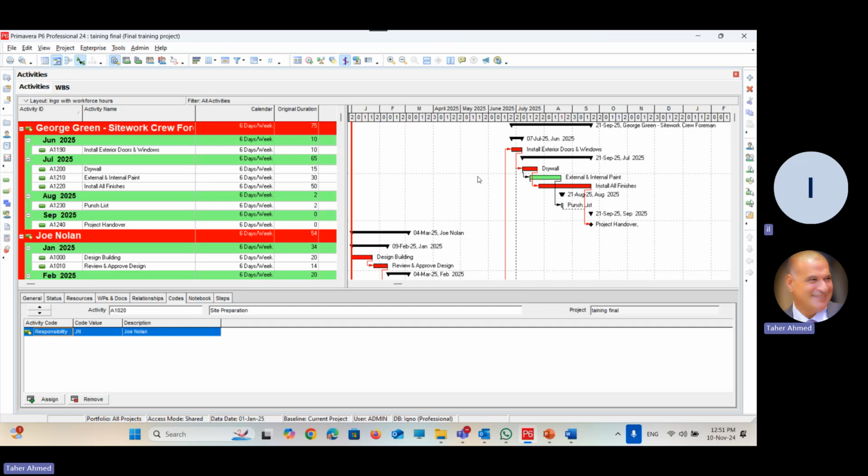We didn't create it. But here, this is how to use the codes we already defined yesterday in making a different layout. This is the benefit of the code. As I told you, the code yesterday is defined first, then assigned to the activity, and this is what we did here, and then use it. This is how to show the information based on the codes.